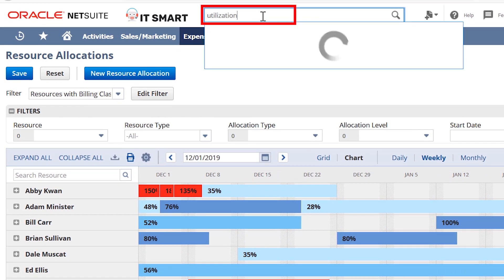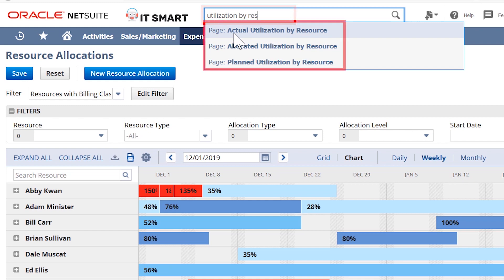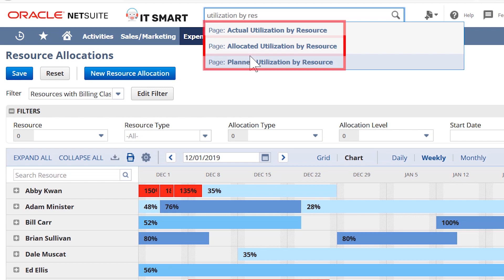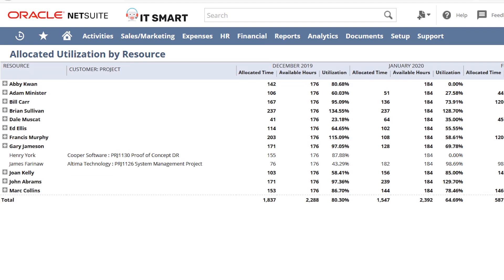In order to monitor my resources utilization, I can quickly reference the utilization reports by navigating through my global search. NetSuite provides actual, allocated, and planned utilization reports, so we can track not only actual entered time of our resources, but also our long-term plan for our resources going forward.